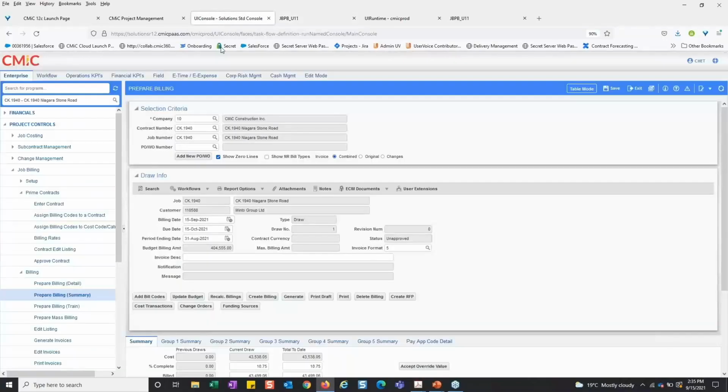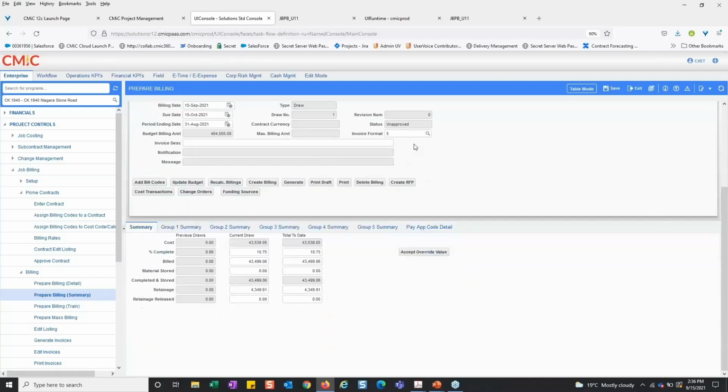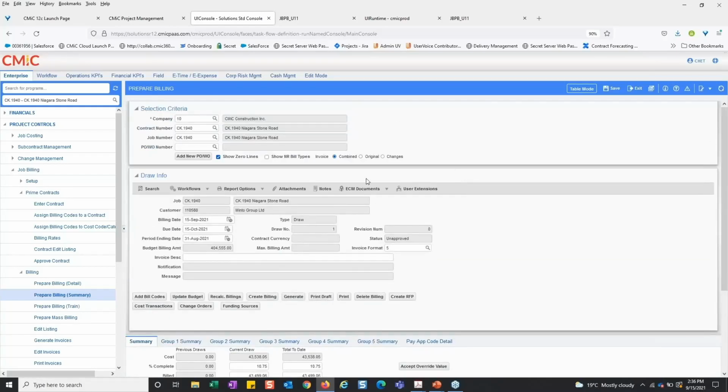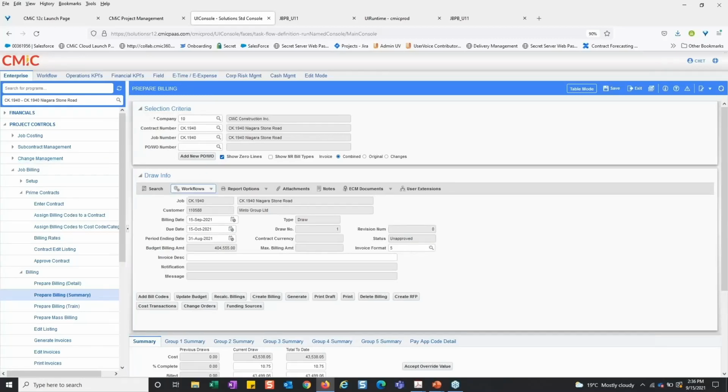Right? So from going from the assign cost codes or the bid item screen, create your contract details based off the mapping rule that you've used. Most likely it's going to be lowest level cost code, lowest level category. That creates your build codes so that as soon as I have cost posted, the system knows what contract line is mapped to which cost code category combination. It applies any necessary markups for me. And now I've gone ahead and produced the bill, and all that's left for me to do is actually go ahead and post this invoice and effectively create that open receivable for this particular draw.